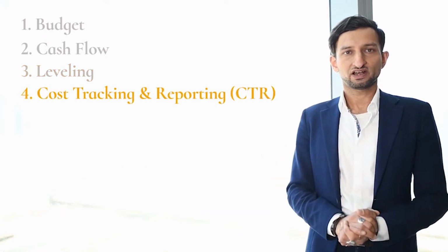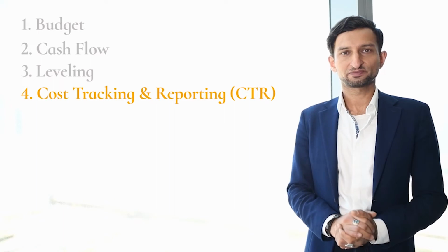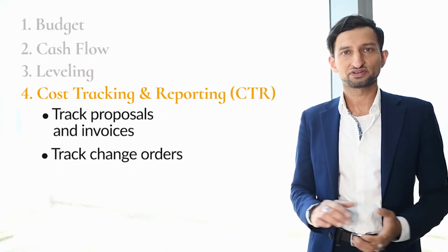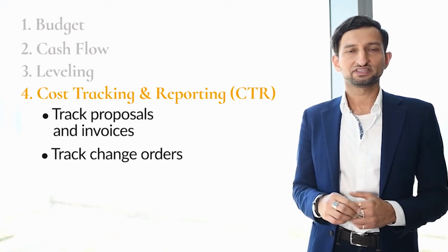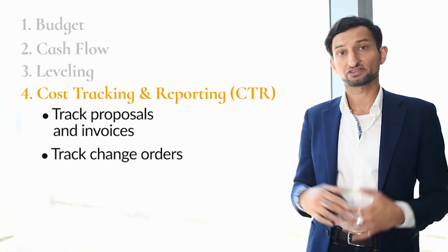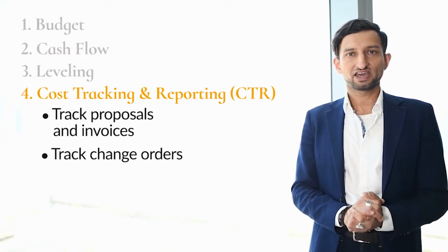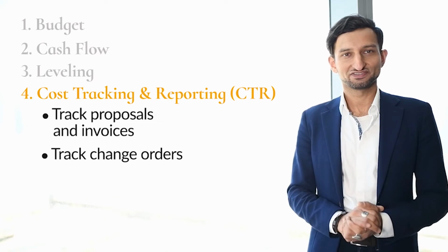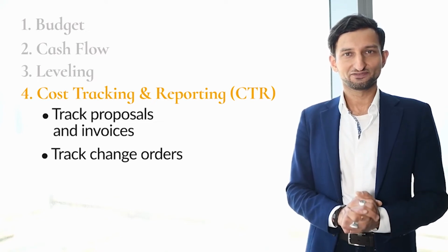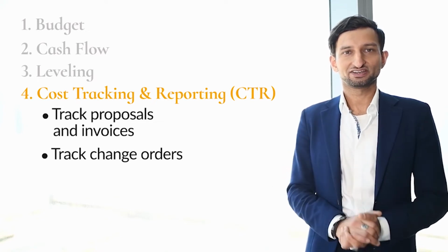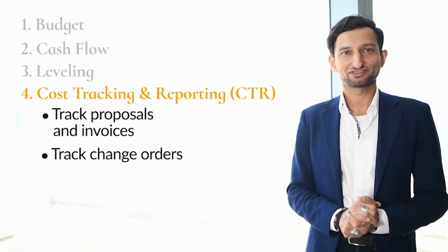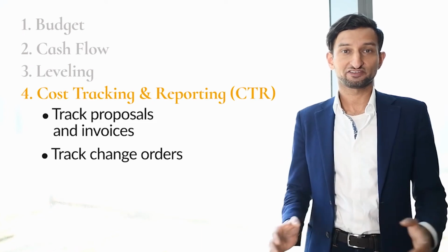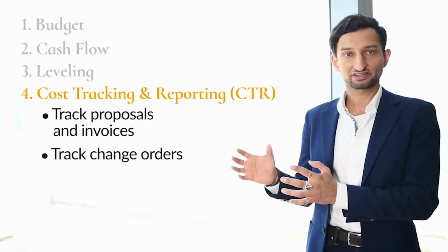Next up, we have cost tracking and reporting. So once your project gets going, it is important to start tracking all proposals, signed orders, quotes, and proposals, and also all the invoices and payments that are due to each vendor and also paid to each vendor. Owners and managers should start this process from the very beginning of a project and not just in the construction phase.